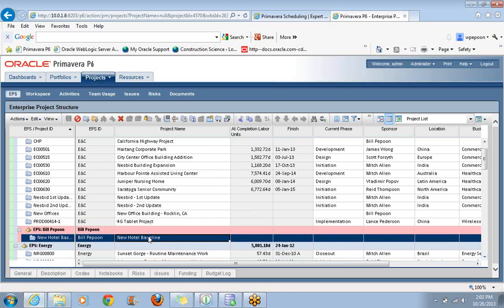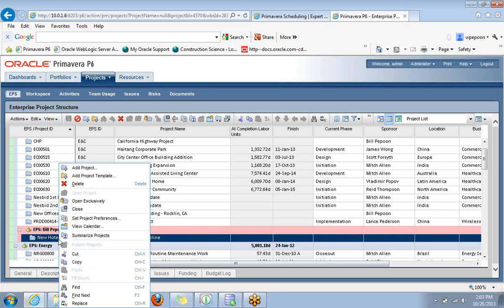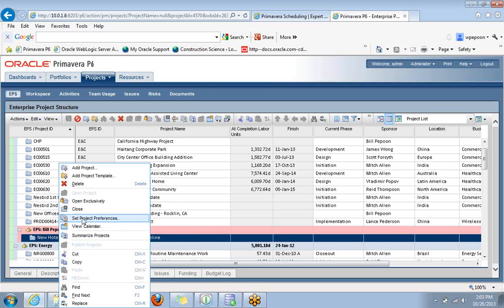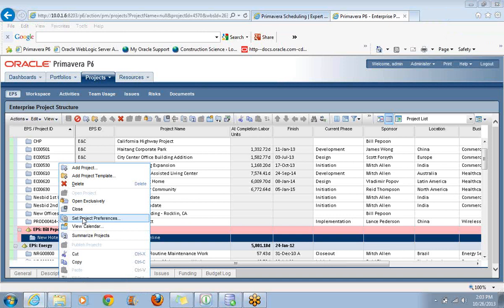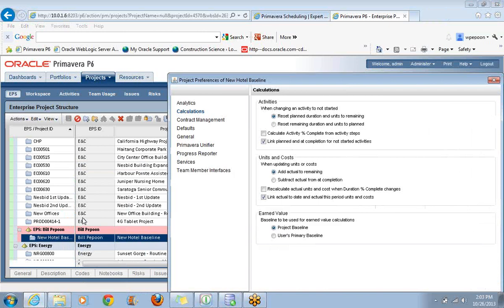Now you might remember, especially in P6 Professional, that we had this Defaults tab in the bottom window. So down here we would have the ability to set up Project Defaults. Well, it's not here anymore. It's in a different place. How we do it now is by right-clicking, and you'll see Set Project Preferences. This is really important because we don't want to start adding new activities to this project without having a chance to set up our numbering system for those activities, the default calendar, things like that.